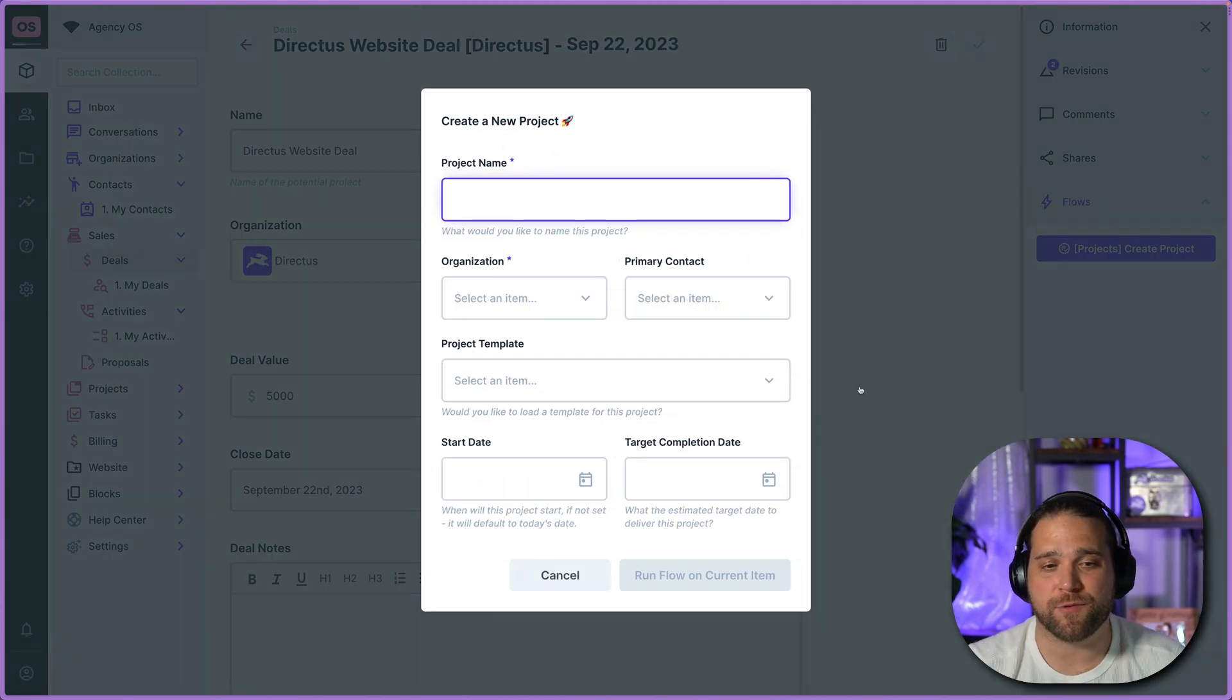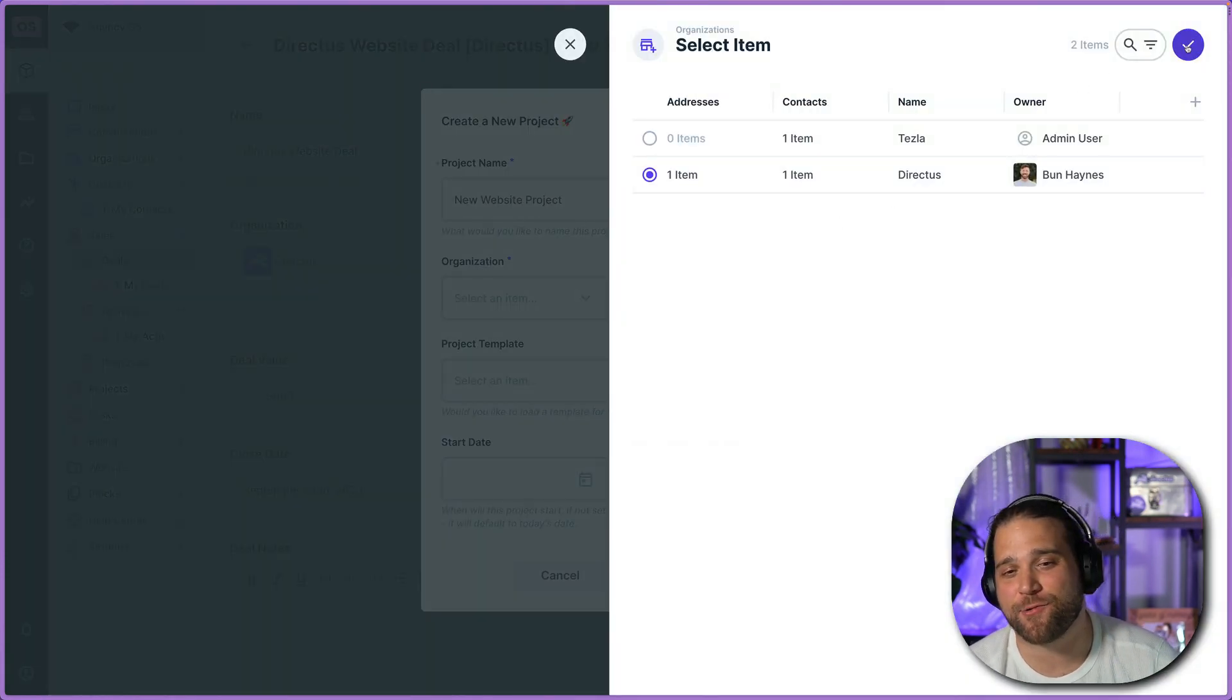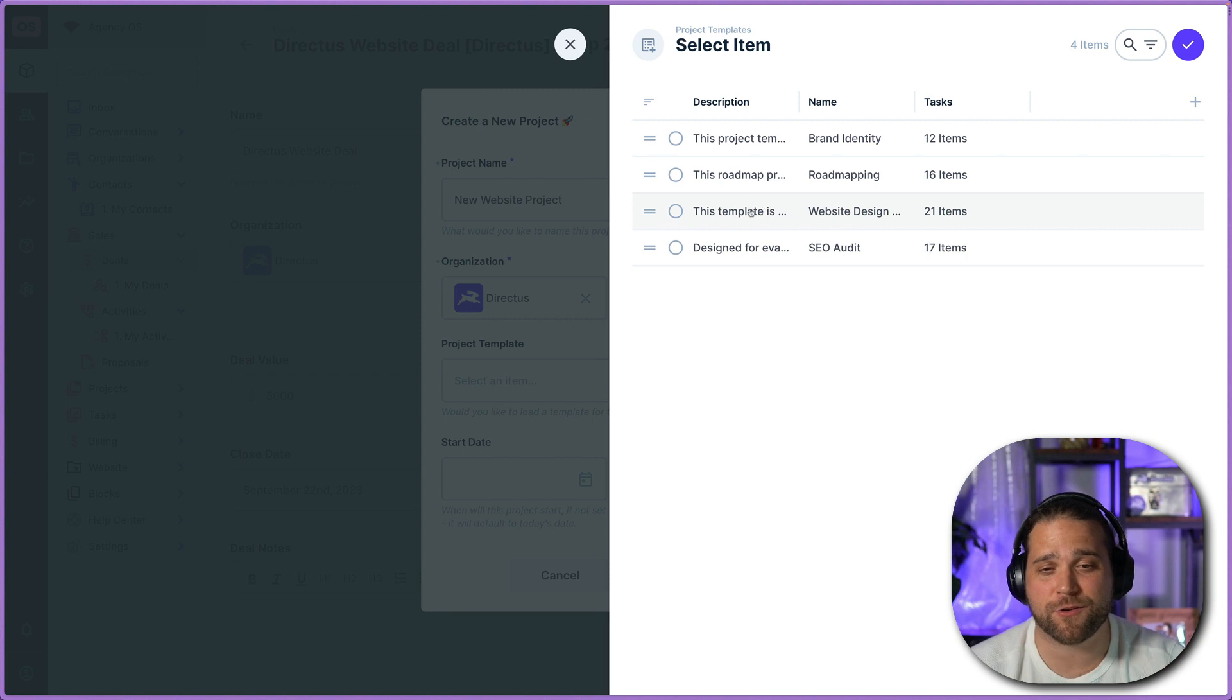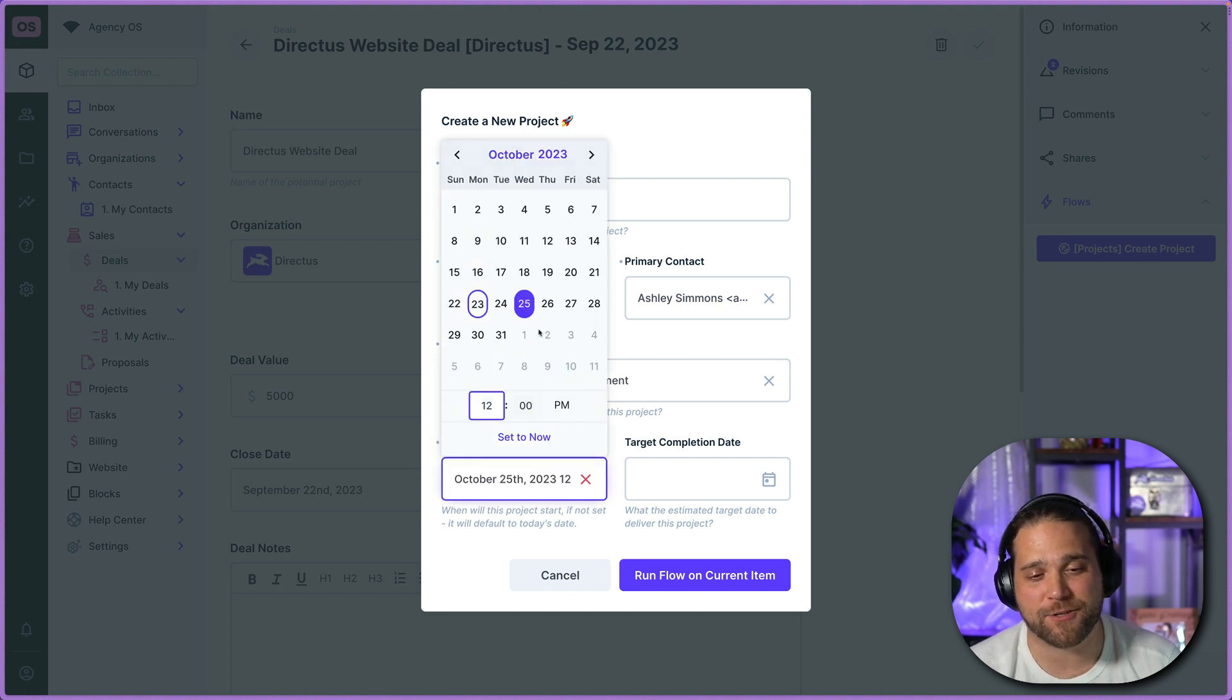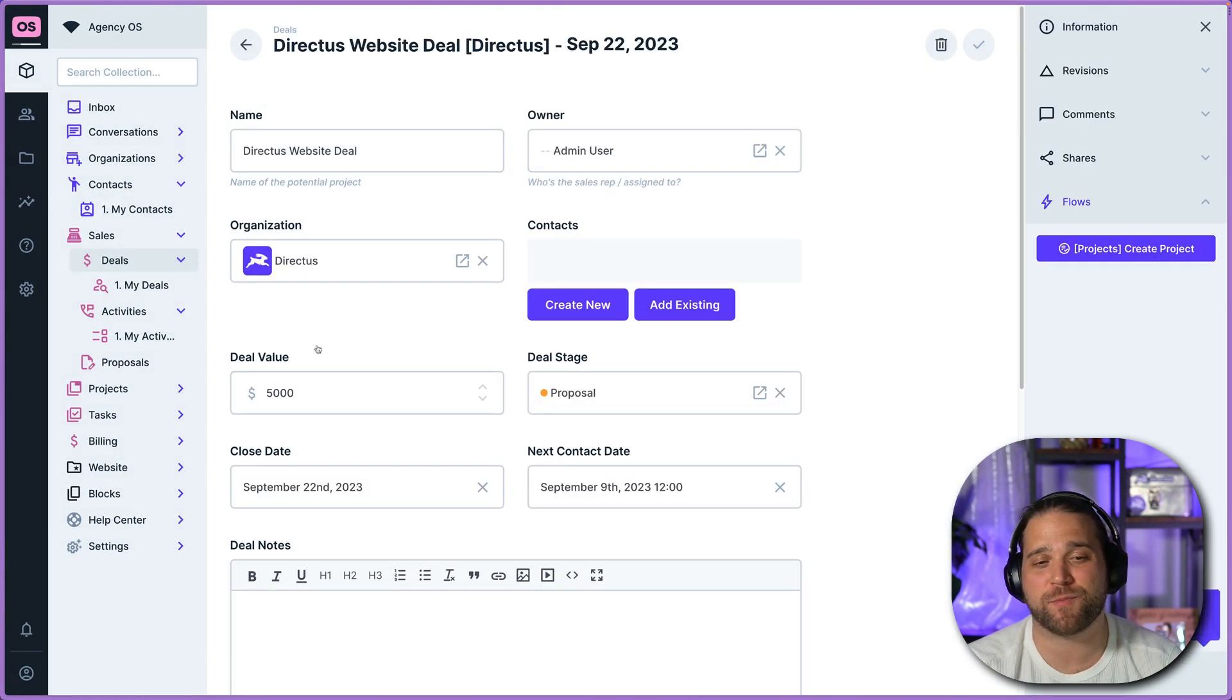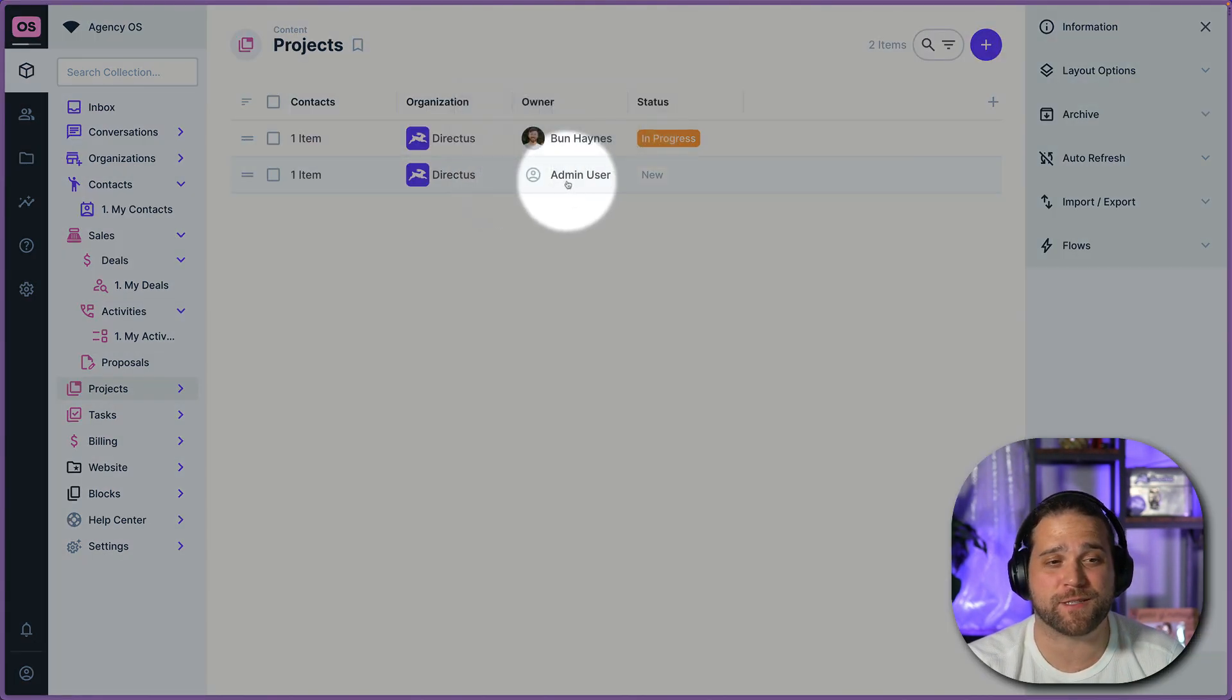So we'll click on create a project on the right information sidebar. We'll give this project a quick name, new website project, select an organization, Directus in this case, select our primary contact, and then we're going to pick the project template. So these are already preset in AgencyOS for you. We'll show you how to customize them in just a few. Then we'll pick a start date for the project. We'll choose a completion date or a target completion date because projects, especially web projects, don't always go according to plan. But that's what we're trying to fix.